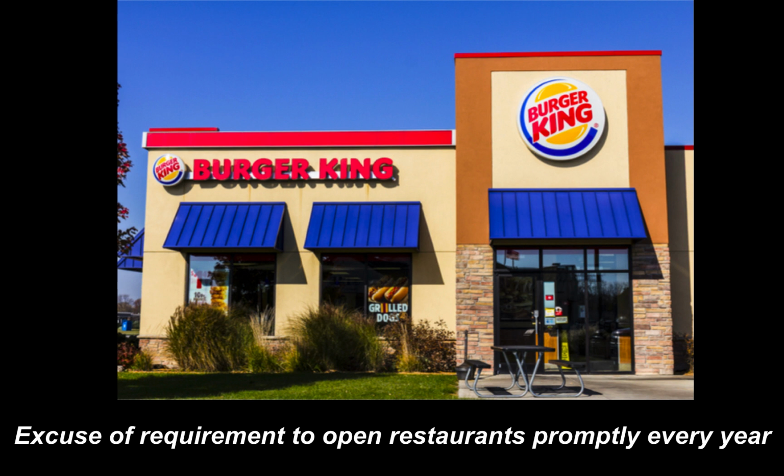Although the schedule was an express condition and not a promise, and although this express condition did not occur, the court considered that Family Dining would have disproportionate forfeiture if the contract was no longer in effect. It moreover pointed to the fact that Burger King did not object to the early delays, and that if Family Dining were forced to forfeit the right of exclusivity, it would lose something of incredible value based on its time and investment of money in the area, and the significant risk it assumed in the fact that it had a 80-year exclusivity agreement. And such a loss would be without any commensurate injury to Burger King by the delay.